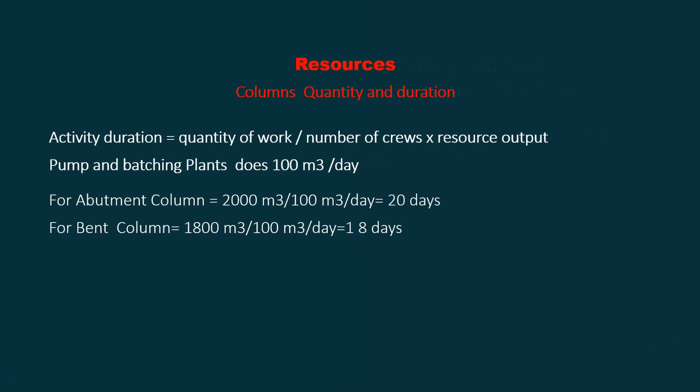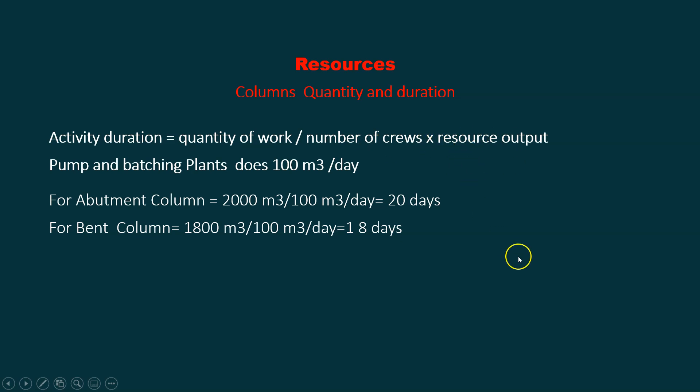For the abutment column, after you do the footing you're going to do the column. I have 2000 cubic meters divided by 100, giving me 20 days. For the bent column, I have 1800 divided by 100, giving me 18 days. It's easy — takeoff quantities divided by the number of crews and how much each crew can do.